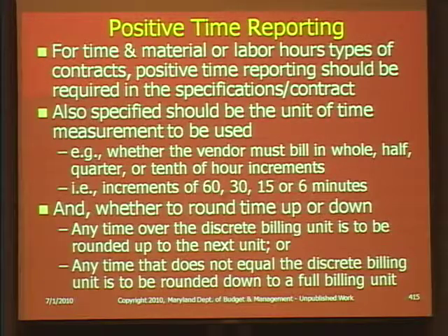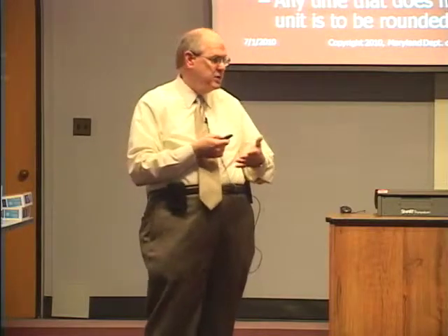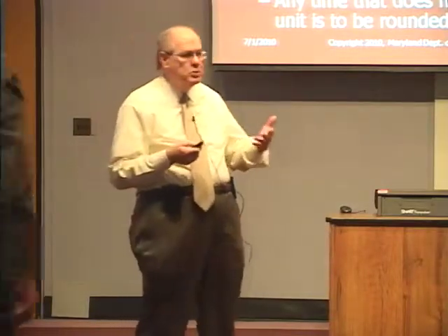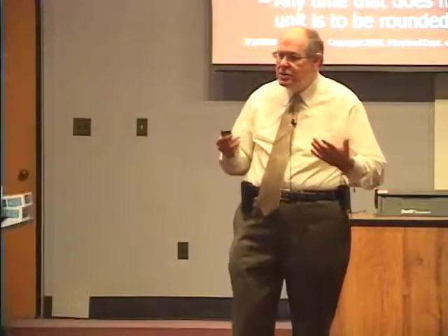And rounding means that, if it's a 6 minute increment, a 10th of an hour, if they go more than 3 minutes, it's going to be rounded up. If they have less than 3 minutes, it's going to be rounded down. If it's exactly 3 minutes, I guess that would be rounded up. That's exactly 50%. But you should address this. And it's not going to be major, but it's simply something that can save perhaps money, because if you think of every bill that might come in on a major project, for every person, for every time they've worked on it, those couple minutes may end up mounting up. And if you're paying time and material, you're paying them. So just specify.